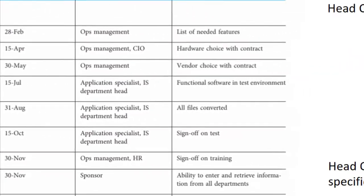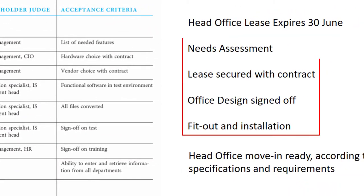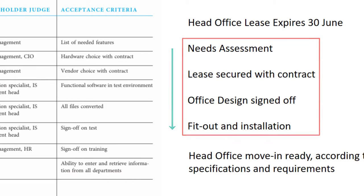In our head office example, milestones may include: a needs assessment, getting the office lease secured, office design, fit-out and installation, and completion of the office fit-out. These milestones could vary depending on the scope of the project.